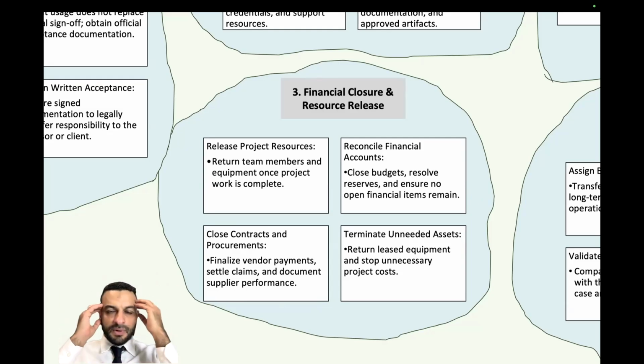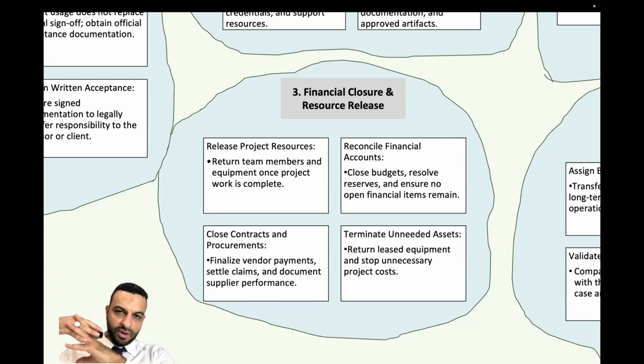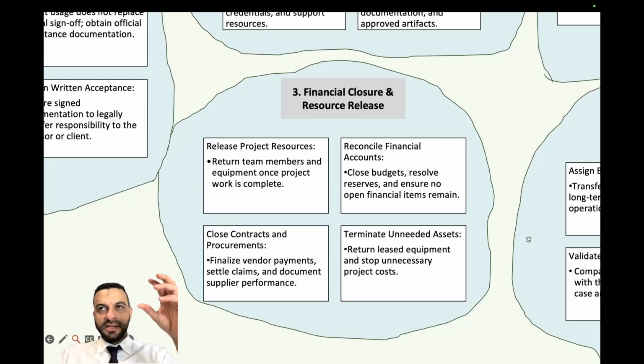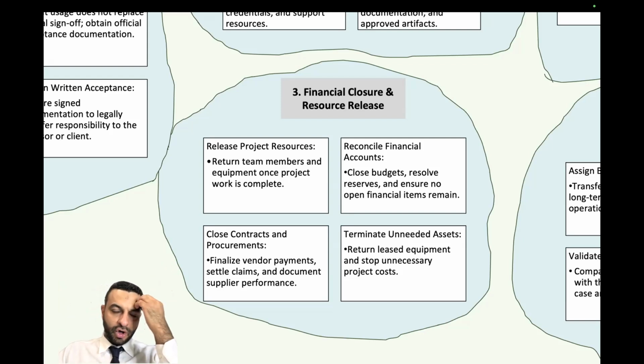And again, for the exam, if you have any buffer in the time and the budget, inform the management, and it should be sent back to the management. This is not what happens in reality, because in reality the project manager normally keeps it till the end of the project for any circumstances, and doesn't inform the management until the end of the project. Of course, this is in case everything is not open, but normally with the new programs and automation systems, everything is clear to the management.